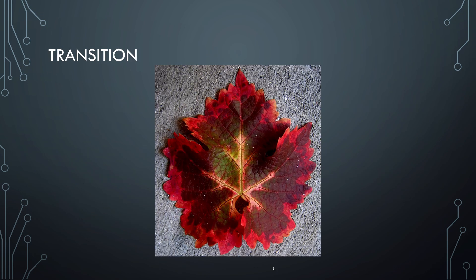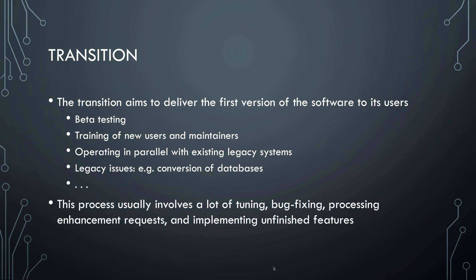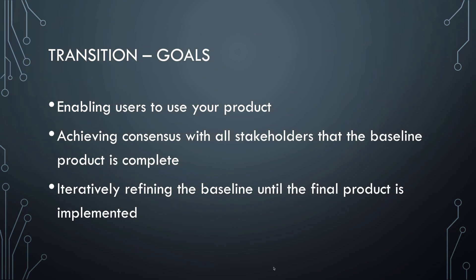The final phase of UP is transition. The first version of the software is ready and we want to put it into the user's hands. This is the phase where you run beta tests, train users, and make sure there's a plan to transition from the legacy system to your new system. There may be work to do like converting old data to new formats or redirecting users from old URLs to new ones. You normally spend quite some time fixing bugs, making minor improvements based on user feedback, and finishing the remaining features. The goal is to make sure users can use the system and everybody involved agrees that the product does what we want.